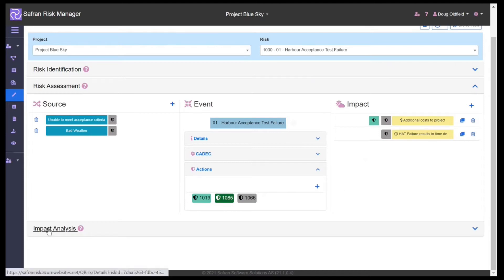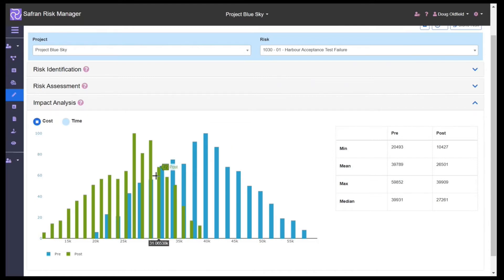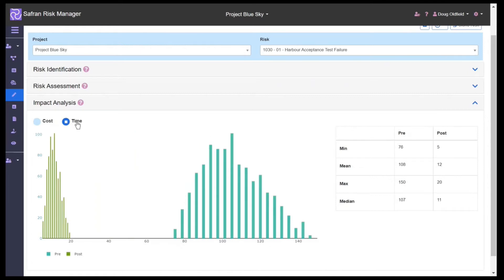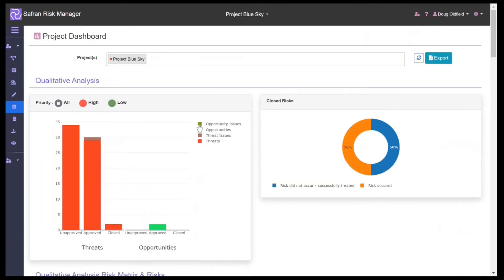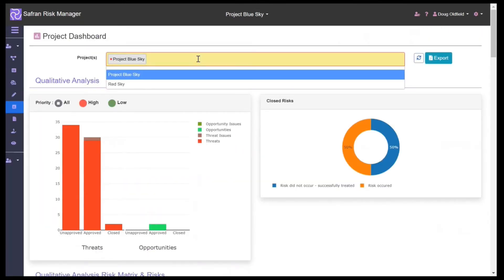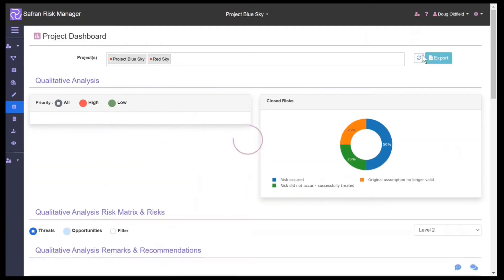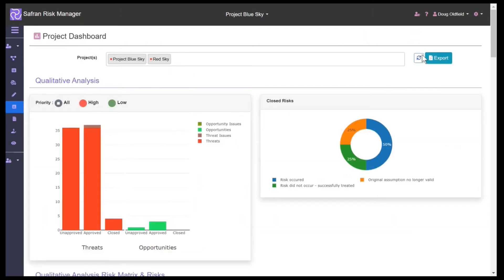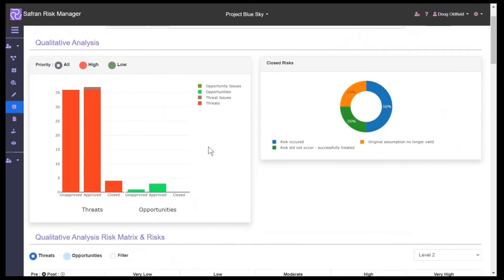Further down in the impact analysis, we can see things on a pre or post-mitigated basis for cost and time. If we move from the individual risk level up to the aggregate view, we can start to look at the aggregation of our risks on a project-by-project, program, or portfolio basis using the dashboards which we can interact with and redraw to show information that's important to us.